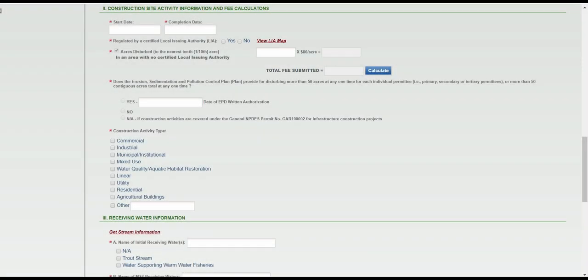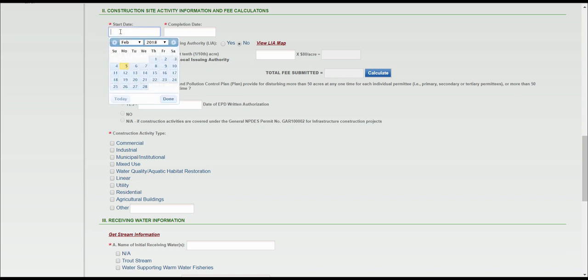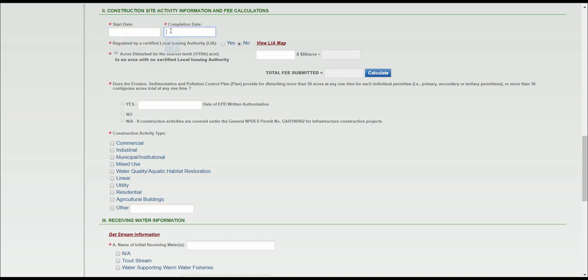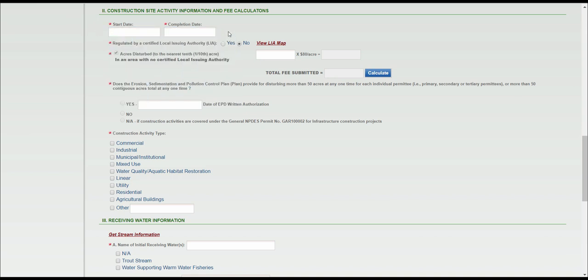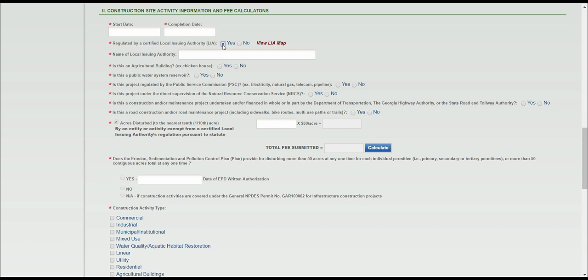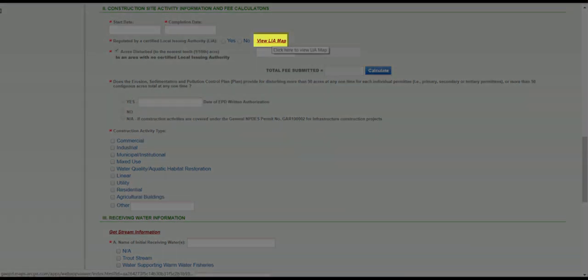Construction Site Activity Information and Fee Calculations. When you click on the Start and Completion date, a drop-down calendar appears. Select the dates that apply. If the site is regulated by an LIA, click the Yes radio button. Additional questions will appear. If you're unsure if the site is regulated by an LIA, click View LIA Map.